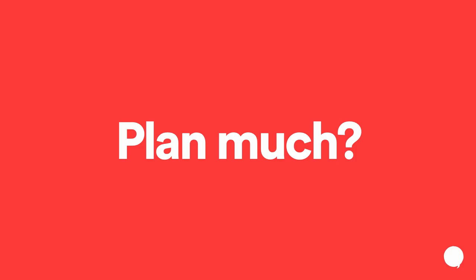A lot of it was agile coaching on what a good user story is. They didn't do the best user stories, but that wasn't the priority. The priority was to get what the needs were out so that then we could work on them during sprint planning or during refinement and grooming. They did a lot of epics and user stories, and they picked it up pretty quickly. We were doing a coaching session with them, one, sometimes 2 days a week, and it took a couple of weeks. At first the user stories were kind of way off the mark, and we were able to say, well, maybe if we said this different thing, or what did you mean by that? It took a couple of weeks, and then they really got the hang of it to a point that was really useful.